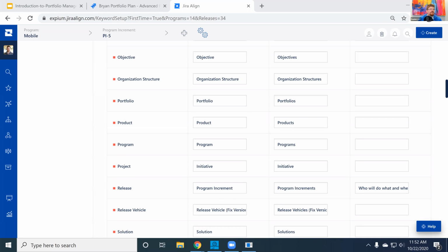All right, related to advanced roadmaps in Jira, you get an email update of every item change if you're a viewer or a participant. If I use the auto schedule feature, playing around with dates, will that impact my colleague's email box? You are a very kind person to worry about your colleague's email, and I appreciate that a lot. No, everything that you change within an advanced roadmap plan will not go out in email. Only when you push the change will it go out. And if you're having troubles with a flood of email, we can help reduce that. One hint is just take Reporter off of the notification scheme in Jira. A trial version. I'm assuming you mean a trial version of advanced roadmaps.